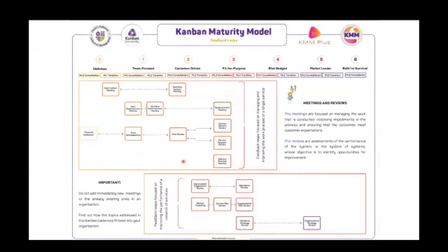These are the feedback loop models that we discussed. What are the various meetings that you want to set, and at what maturity level? Not every meeting should be set at all maturity levels. And do not add the meetings immediately, because Kanban is an evolutionary change method. First of all, understand how you are working right now, because you have been working for so long. You might be doing all the things correctly. So find out how you are working right now and then try to improve them slowly. Not every meeting has to be done at every level.